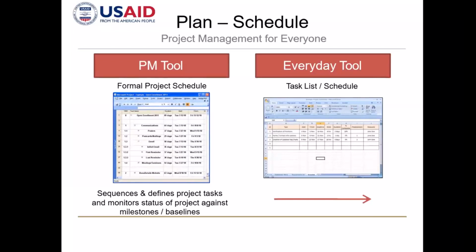And normally we have a tool for it that we use in project management, right? The Microsoft Project. But in most cases, they also use Smartsheet, right? But what's important is to list each major activity and divide them into tasks and subtasks so that you can clearly define the duration of each major activity, each major task, each subtask, and when you total all of them, you will come up with your full schedule or the final project schedule that you have to put in your project plan.